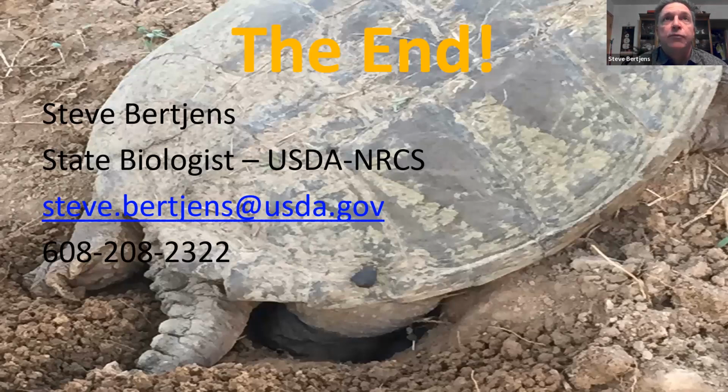Because we ran into that in the past, and what the engineers said is, as long as it's on the design plan, we're good to go. What they don't want to have happen is we're out there with the contractor and then we're like, oh, boy, it'd really be nice to have a rock deflector right there. Or it'd really be nice to have a series of boulders in that area.